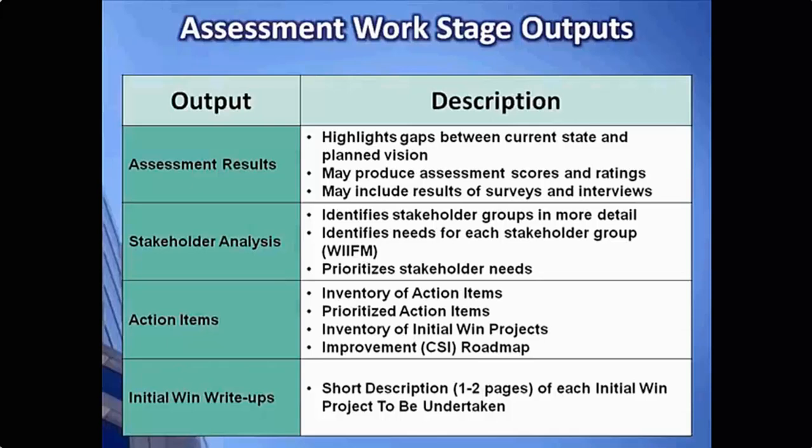Again, some of that will be driven off some of the surveys that we identified in Learning Module number 2, and those are things you can do to analyze the stakeholder needs a little more in detail. Action items will then be developed. We need to combine our gap analysis with what our stakeholders are looking for to help prioritize and identify which actions to look for. And then we will translate those action items and group those into initial win projects.